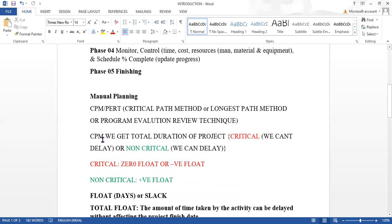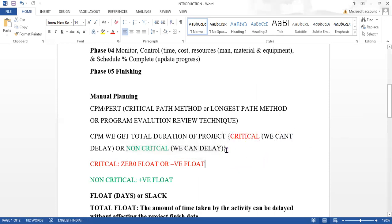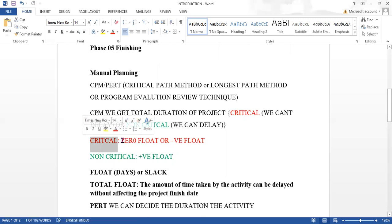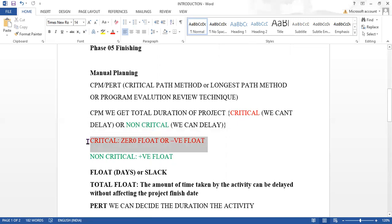Using the CPM method, we get the total duration of the project and we can decide whether we can delay activities or not. If an activity is critical, it is not possible to delay it. If it is non-critical, you can delay it for some days. For critical activities, the float is zero or negative. If you delay a critical activity, the project finish date will change.